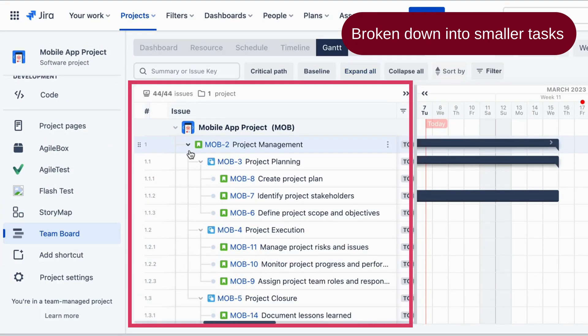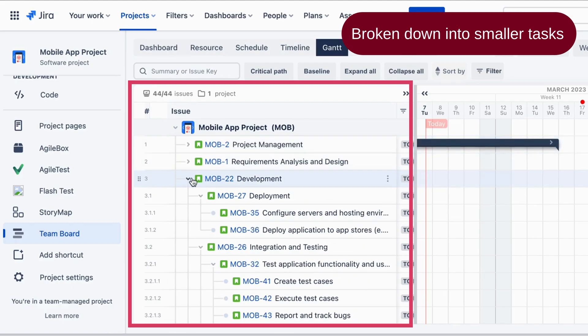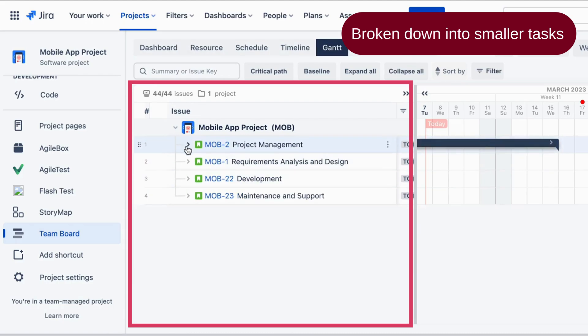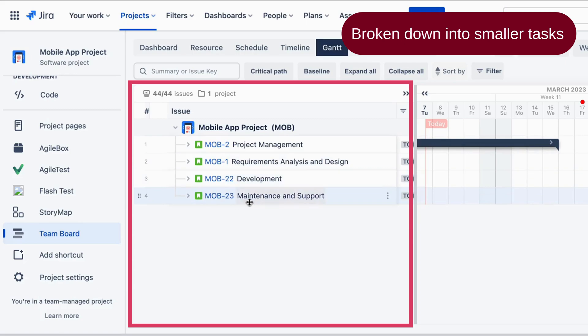Project management, requirements analysis and design, development, maintenance, and support. Each WBS element has been further broken down into smaller tasks.